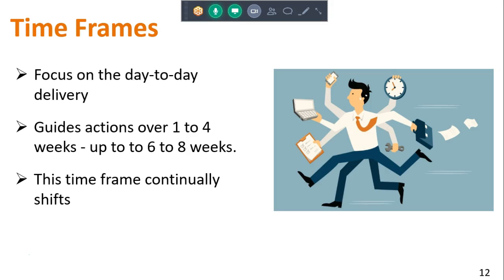Obviously, there are going to be times when you may not be able to do that, but you want to minimize that. You really want to be working on some sort of consistent schedule, and making your team and your business stakeholders aware that that's what you're doing. You're setting a basically 2 week alarm clock that says, when the alarm goes off, this is where we're going to be, this is what we're going to deliver, and that's how we're going to put together our process, so that every time the alarm goes off, we know that we've got to deliver something.